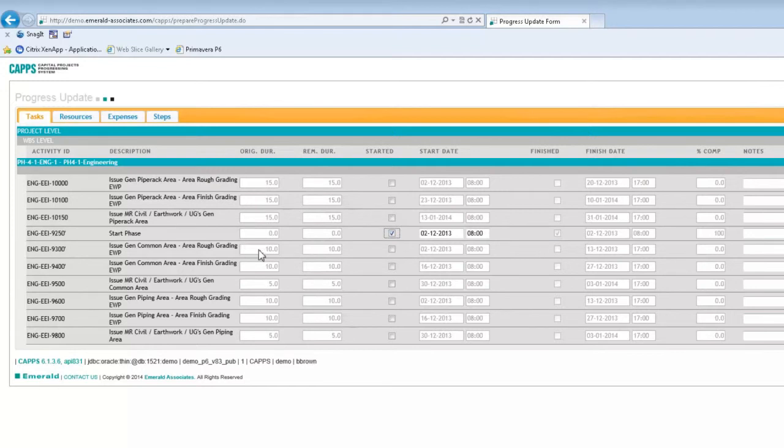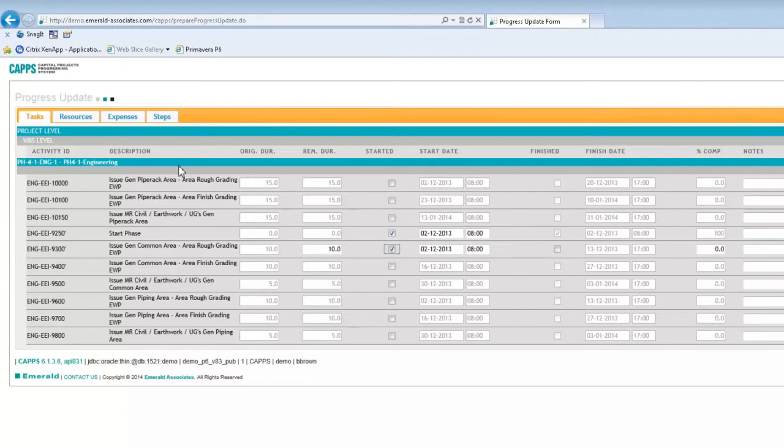My next task will be 9300. So this task has been fully completed during the past period, and it was completed as planned. So I'll select the started checkbox, and then I will go to resources tab.